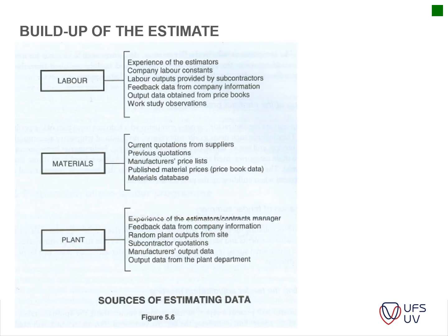So, building up of your estimate. Also a very important slide to know is your labor. So you've got the sources of estimating data. The accuracy of your rate build-ups is influenced by the experience of your estimator and labor constraints. How much labor do you have? Do you have to outsource other labor to assist you to actually get the numbers on site? Labor outputs provided by the subcontractors: will they be able to actually do the work within the allotted time? And then feedback data from company information.